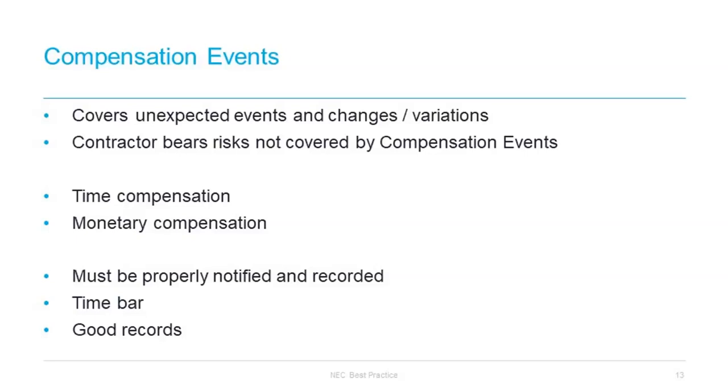Now, in our experience, that really is only done for particularly straightforward events. The defined costs are different from the agreed tender prices. This, as I mentioned earlier, reflects the NEC approach of reimbursing the contractor on a cost-plus basis for the monetary consequences of events which are not its fault. The calculated change to the defined costs plus the associated fee is then added to the prices.